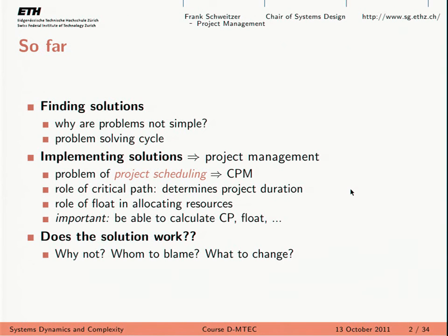What buffers are good for, however, is to shuffle resources around. So if you have a critical activity with no buffers, or with zero buffers, then you can shift some of the resources from tasks with a lot of float to it, and then hopefully speed up the whole process. We saw an example in the last lecture, and probably there would be a similar task required in the exam.